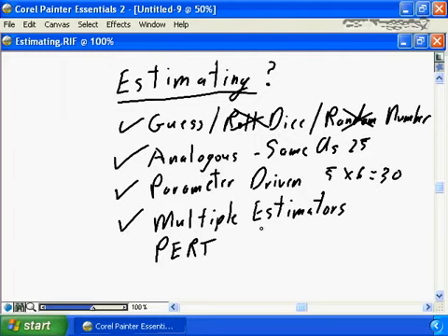You would ask 2 or 3 or 4 people to go away and develop estimates for these work breakdown structure elements, go away and develop estimates for this component for my project plan, and then come back and compare and rationalize and develop sound estimates based on the results from multiple estimators.